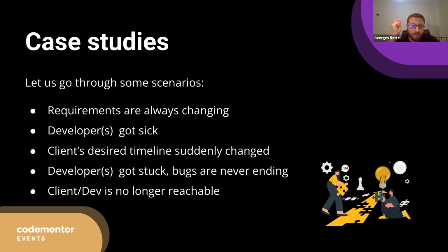It's important to do that because all of the hassle that you do at the beginning will save you much more at the end. That's why most of the projects take like 6-month development and then a year or so fixing bugs and changing stuff. However, if you invest 3 months, you're gonna get 3 months research and then 6-month development and probably 1 month fixing bugs, certainly not a year.